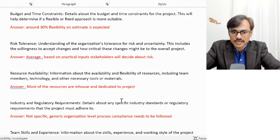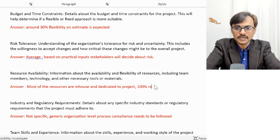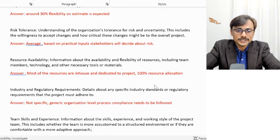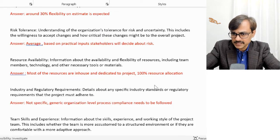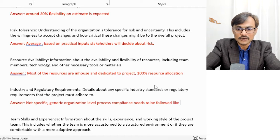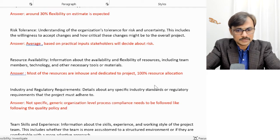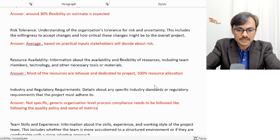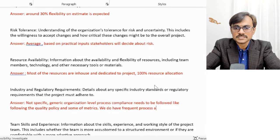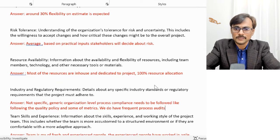For resource availability, most resources are in-house and dedicated to the project — 100% resource allocation, so there's no shortage or issue. For industry and regulatory requirements, I said no specific industry compliance is needed. Generally, organization-level process compliance must be followed, such as quality processes, quality policy, and some metrics. We also have frequent process audits, which is also part of my organization's situation.